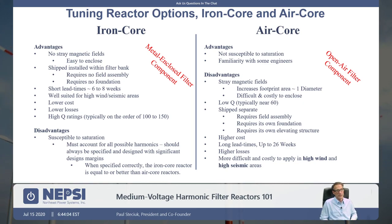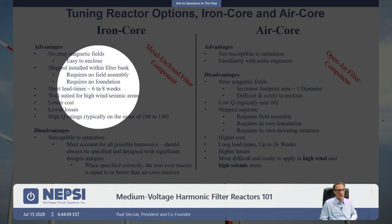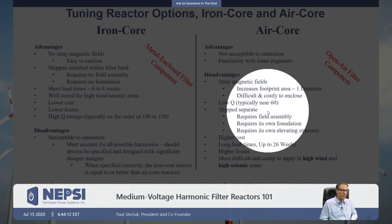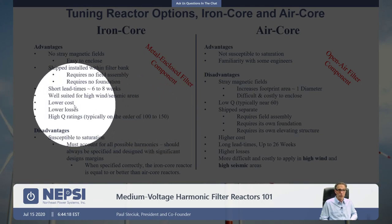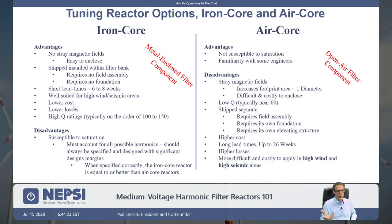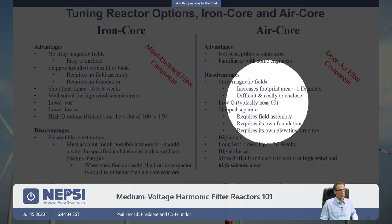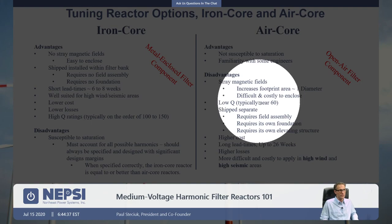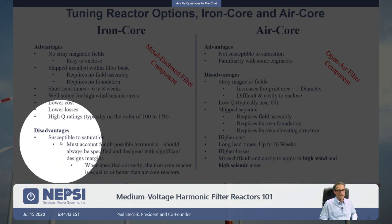Iron core reactors typically have short lead times of six to eight weeks, whereas air core reactors have much longer lead times — up to 26 weeks. Iron core reactors have lower cost and lower losses. The losses of an iron core reactor are based on the I²R or X-over-R ratio. X-over-R for iron core is about 100, while for air core it's about 60. This is a common misconception — people think iron core has higher losses, but since X-over-R is higher, I²R losses are actually lower.